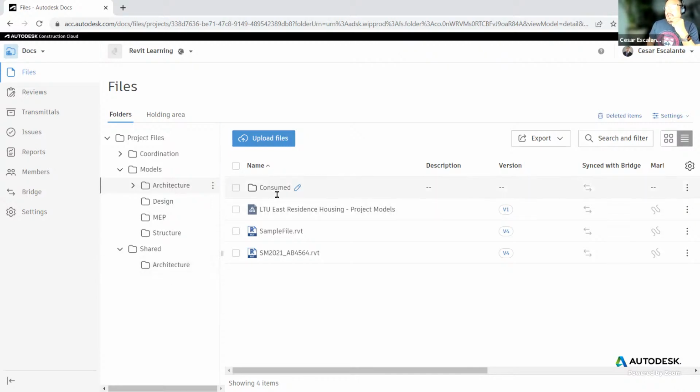The markups are associated with your credential, so the recipient will know who authored them and have the ability to proceed with that change. The other good thing about the markups is that the file could be replaced with a new version, but the markups will remain.